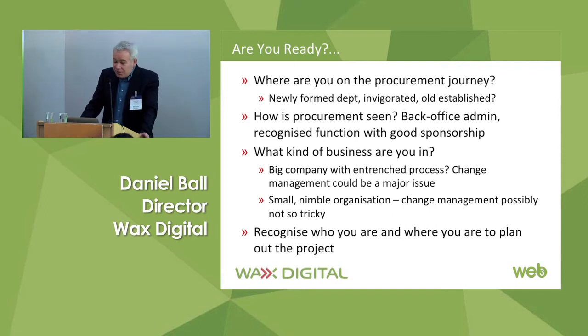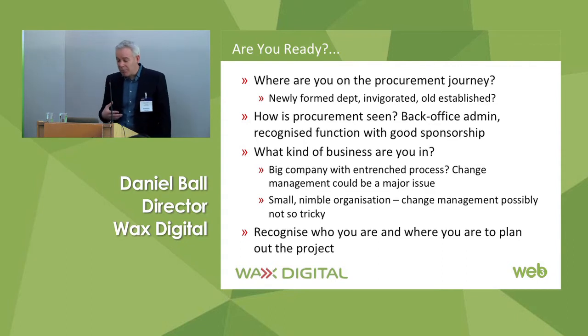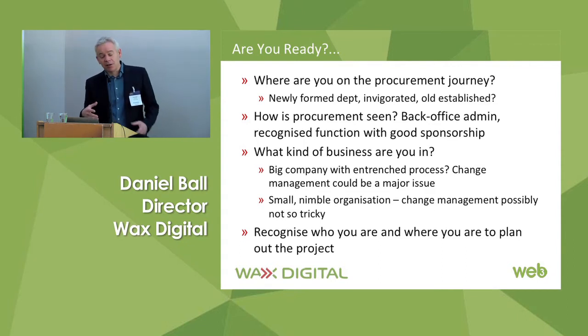WSH, on the other hand, is a different example. It's a food services business client of ours. It's much more about direct spend, so it didn't really have that battle to fight. But it is a huge business, and since we're dealing with direct spend, it's very risk aware. So they started small with electronic invoicing, although they process about 2.1 million invoices a year, so it's not that small, to get the benefit of one area of the solution deployment and then roll back into the other areas of purchase to pay to support electronic invoicing.